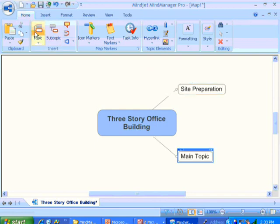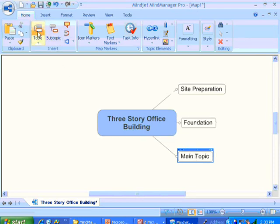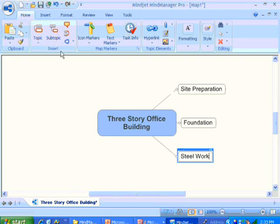And by clicking on that item and then Topic, then we can add another item within our WBS. Perhaps we'll call this Foundation. And then a third item within the WBS. We'll call this one Shell Work.